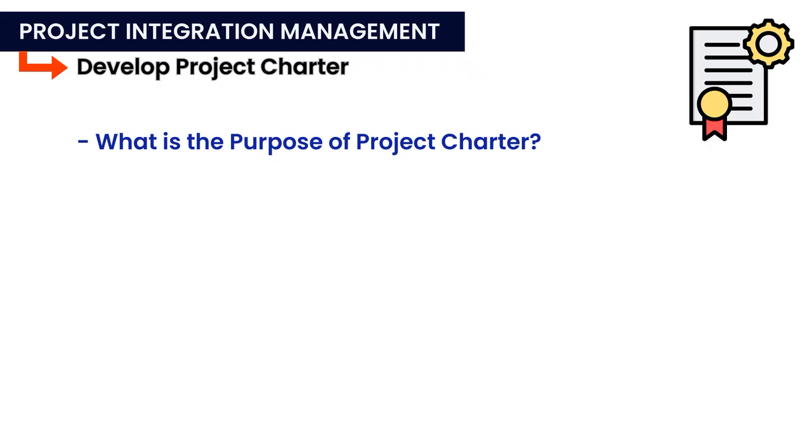Before we proceed, we should know the purpose of project charter. Project charter formally authorizes the project or phase. It documents initial requirements to meet stakeholder expectation. Now, the second question which comes in our mind is who creates project charter? Typically, it is developed by the project sponsor in collaboration with the project manager. It contains high-level information for senior management to evaluate project viability.